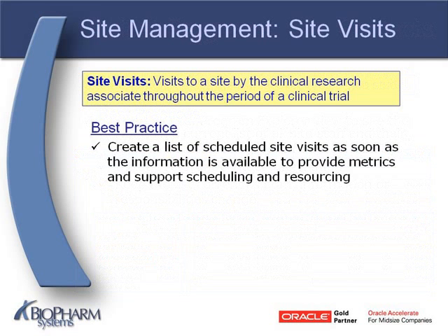Site visits within site management. It's a good idea to create a list of scheduled site visits as soon as the information is available. This process will provide metrics around planned and actual visit dates and may also help identify how often site visits are rescheduled and why. Advanced planning also helps CRAs create and maintain a master study schedule for reference and planning purposes and helps study managers gauge resource planning and study progress.